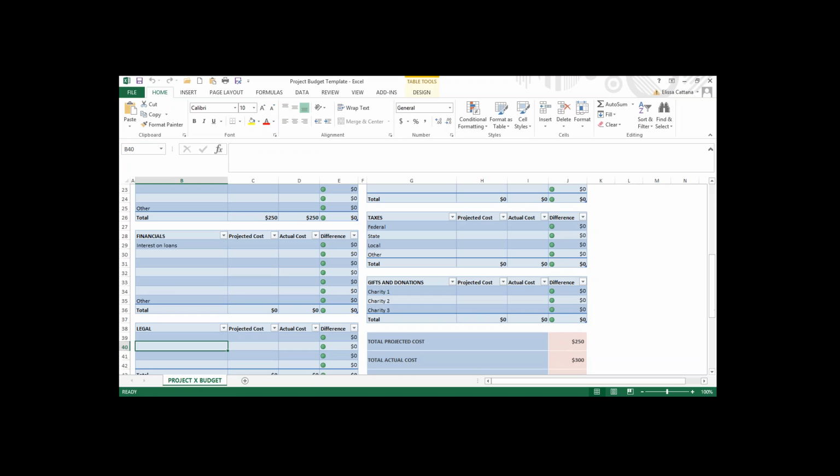So, consider everything. That includes financials. And when we're talking about financial considerations, you might be considering things like how you're going to be getting the money for the project to begin with. Are you going to be taking out a loan? If you are taking out a line of credit, there's money that needs to be paid back in interest each period. So consider all of the costs.